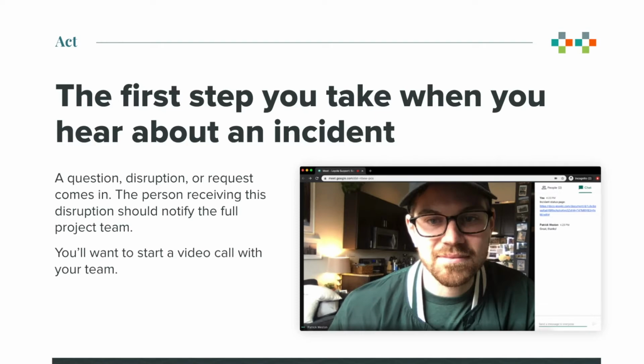This may include leadership, or you may choose to notify leadership separately if they have a close working relationship with the client or the disruption is of a greater magnitude. But you'll certainly want to validate with your company who needs to be notified of an incident. Next, hop on a video chat. You want to get people on a call to start organizing and talking. Move the conversation out of Slack or out of email and into a video chat.